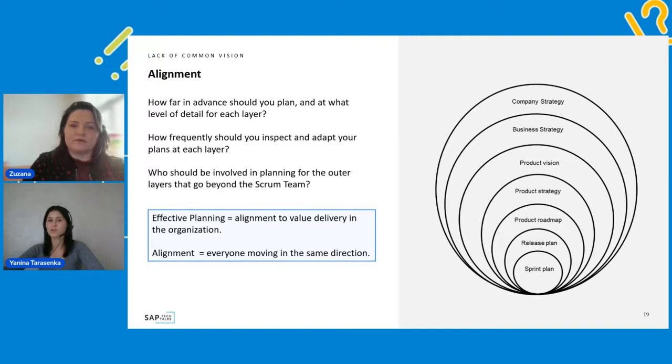We know that in the waterfall approach, for example, or any kind of iterative approach, when your requirements are clear and you have the agreed scope, of course, your planning will be scope driven. You have the scope, you have the milestone, it's aligned, it should be done, and nothing will change. In Agile, vice versa, we have the planning, but first of all, we value the value, and our scope can be easily adjusted.